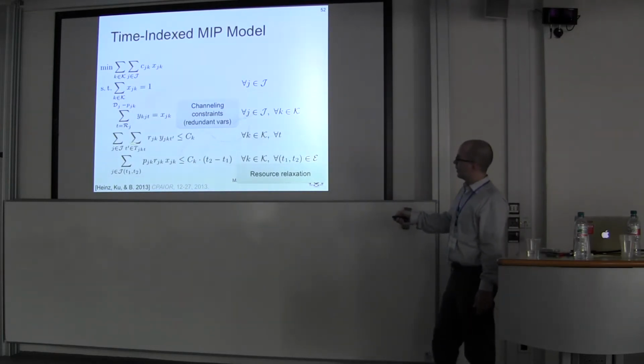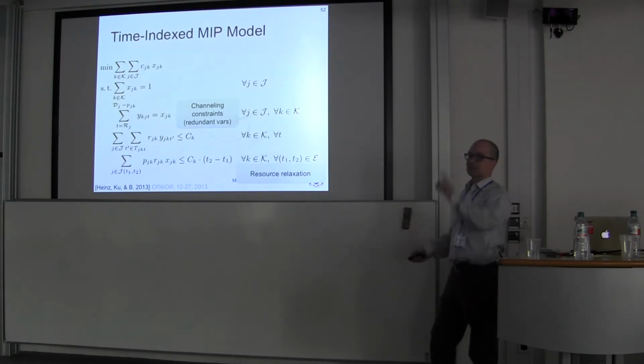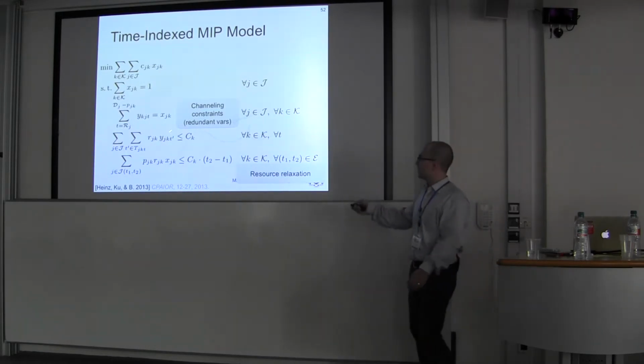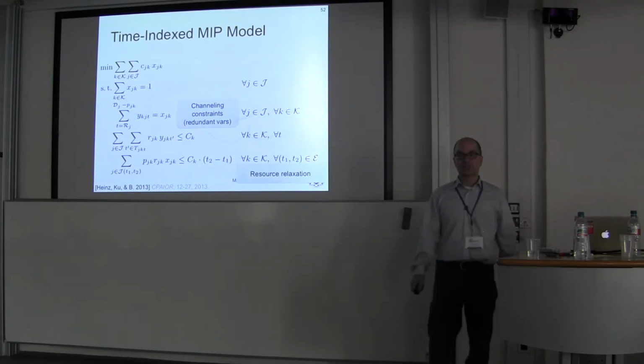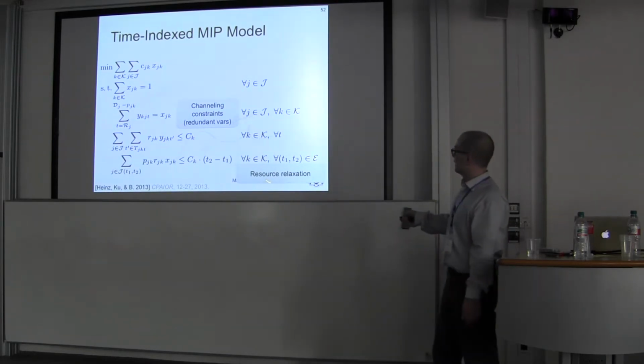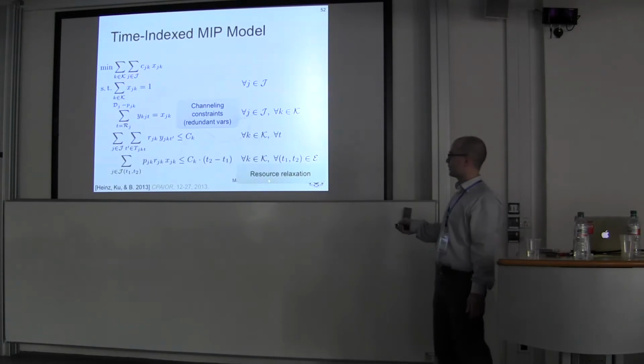I'm not going to go into the gory details here, but basically what this is doing is summing up the start time variables to make sure that at every time point they're less than or equal to the capacity. This is a resource relaxation.